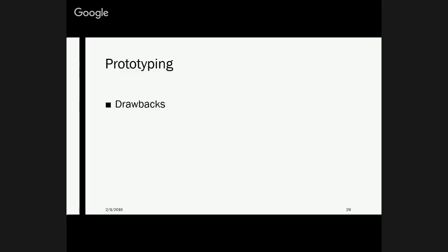So of course, I'm just making prototyping sound like the end-all solution, but what tends to happen in prototyping is some of these more formal things which can be useful just go by the wayside. So you don't document something. Someone tells you something, you're like, oh yeah, I can do that. You code it up, you show it to them, and then a manager sees it and they say, why did you do this? Well, you didn't document it. You didn't track down why that was done, who that came from. Because you just, well, I could do it in an hour, I'll just do it. That happens a lot. You kind of get into this thing, why did we do this?